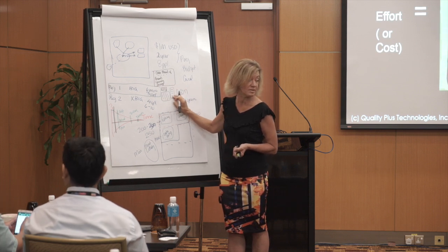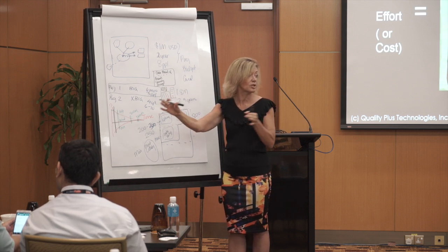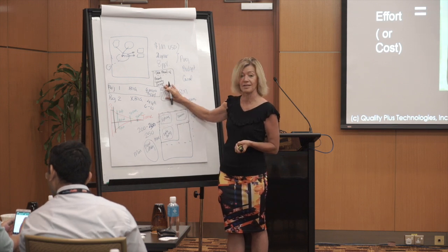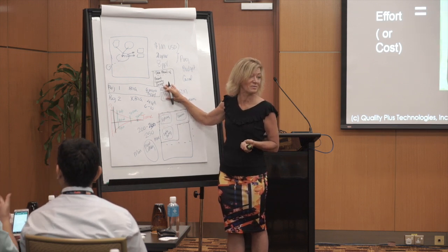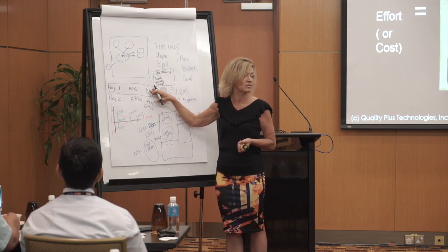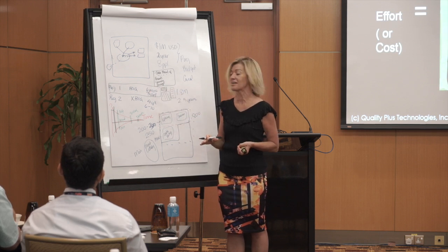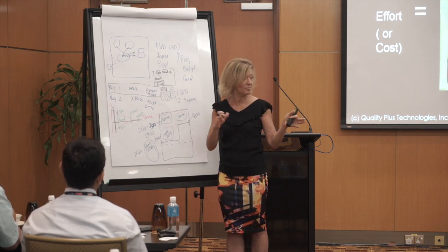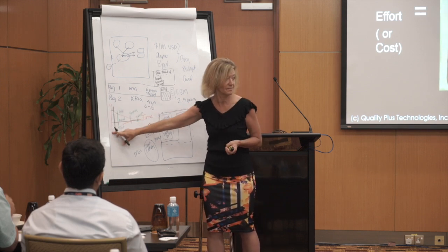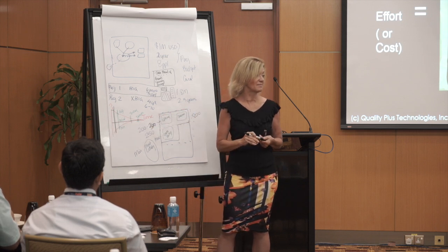So with those, if you're early in the project, it could range plus or minus 30%, because they've got history in all these different projects. When you use an estimating tool that has 8,000 or 10,000 projects in it, then you know that your estimate is probably going to be pretty good. It's better than being way over here. But you're still going to have variability.